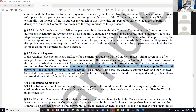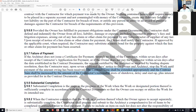If they found hazardous materials — or whatever happens — they stop the work in the affected area but don't stop work everywhere. A real stop work order, like the one in 9.7, is a complete stop — they take their tools and leave. Stopping for hazardous materials only limits the affected area, and they're entitled to payment for continuing elsewhere. The contract time should be extended appropriately, and the contract sum should be increased by the amount of the contractor's reasonable cost of shutdown, delay, and startup, plus interest as provided in the contract documents.